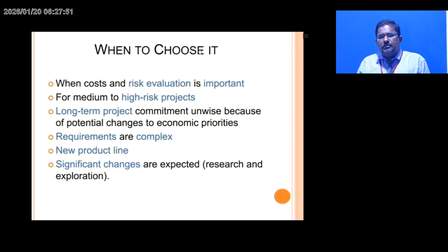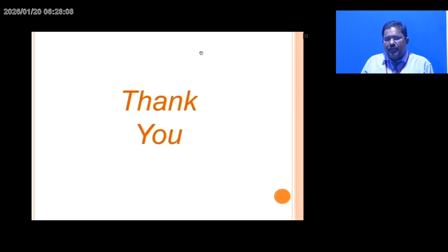When to choose it? When cost and risk evaluation is important. For medium to high-risk projects, long-term projects, when commitment is unwise because of potential changes to economic priorities, when requirements are complex, for a new product line, when significant changes are expected, and for research and exploration.